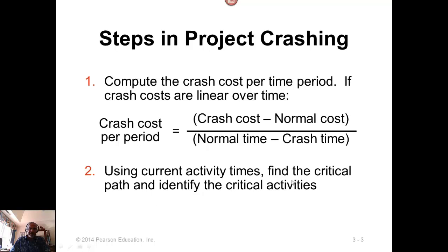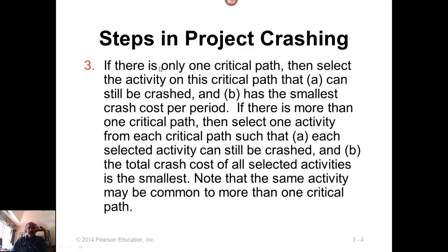Using current activity times, we need to find the critical path. Non-critical path activities are not going to affect your project completion time, so there is no point in crashing non-critical activities. If there is only one critical path, crash the cheapest activity on that path. If there are multiple critical paths, choose one activity from each, or use a common activity that has the least cost to crash.